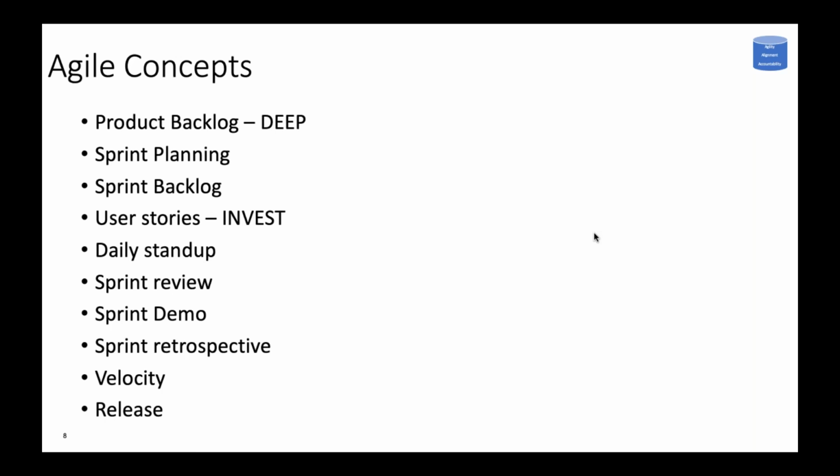User stories, that is where you start estimating or decomposing the feature into more manageable work. They have a characteristic called INVEST. What does INVEST stand for? Independent, negotiable, valuable, estimable, simple, and testable. So it cannot be that, "Oh, I finished this particular user story, but it has no value until someone else finishes the user story." Because once you say that it is done, it is the team's responsibility to make sure that the finished work is valuable to the customer.